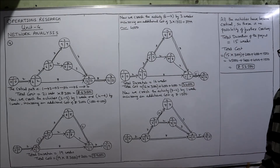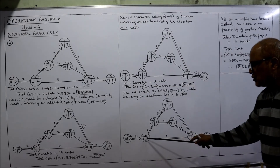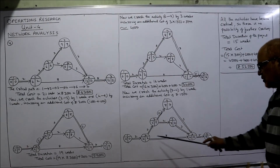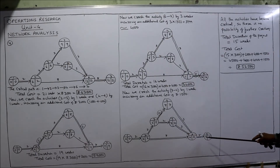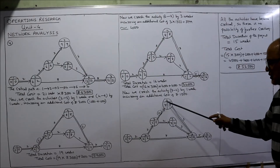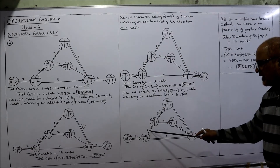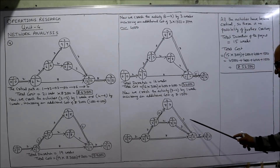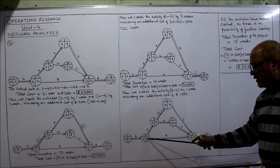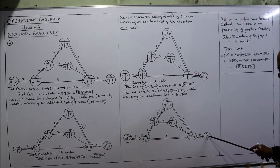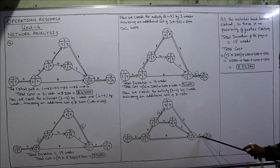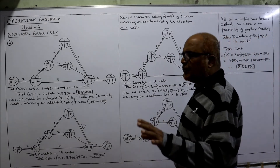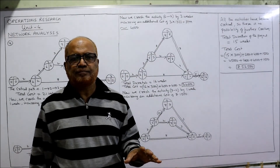Now observe: all paths have become critical. Path 1→2→6→7: 2+8=10, 10+5=15. Path 1→2→3→4→6→7: 2+3+2+3+5=15. Path 1→2→3→5→6→7: 2+3+2+3+5=15. All paths give 15, so all activities are now critical. There is no further possibility of crashing.